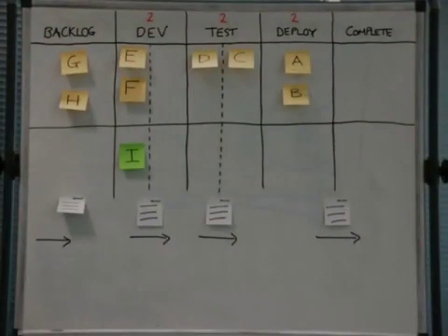So that's where, with Kanban, you can run work in parallel, and that's the great thing, the flexibility that it gives you using the sticky notes. You can adapt this stuff. You could argue that with the ASP.NET app, it's not hard to add a new horizontal lane in there as well. You can also use things like horizontal lanes to represent specific priorities of work. So all of the high priority stuff goes along one horizontal lane, all the low priority another. You might have things like architectural spike work that doesn't need to be tested. So you have that policy there, so the test bit of it would be, put black lines through it, so it doesn't need to go through that until it's done. Does that answer you? Yeah, cheers.